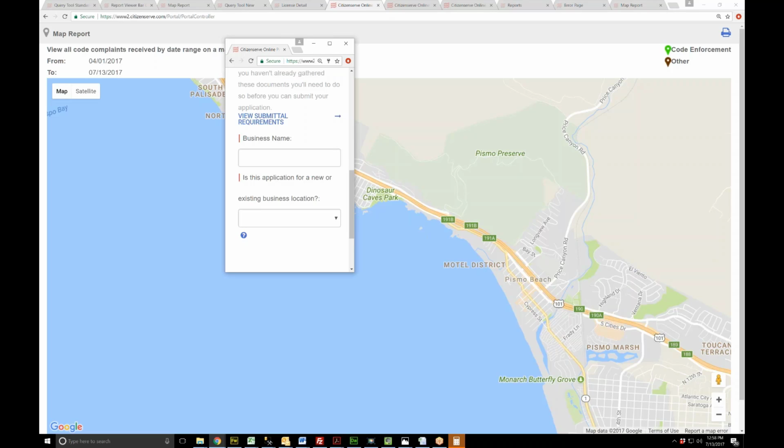We'll typically ask for screen prints: give me a screen print of this license and everything that's tied to it, so that we can do our mapping. And then once we've got it in there for you to review and cross-check, we can set up reports, which is a good way to cross-check it. If you have a report in your current system that shows all renewals in a time frame, we'll set up a similar report in CitizenServe so that you run them both and make sure they match. Things like that help in the validation process.